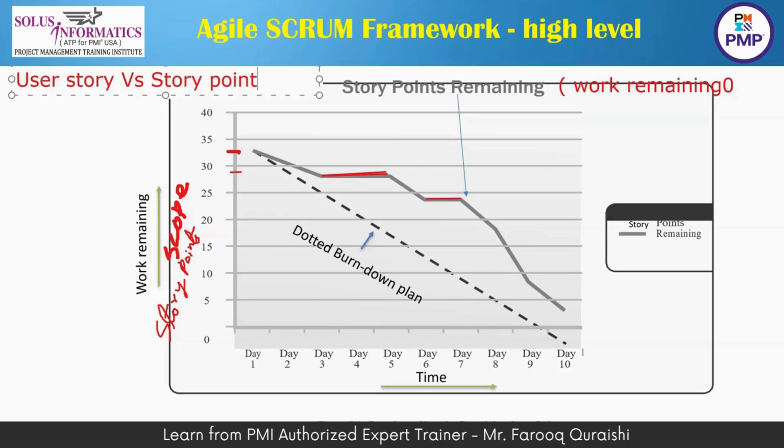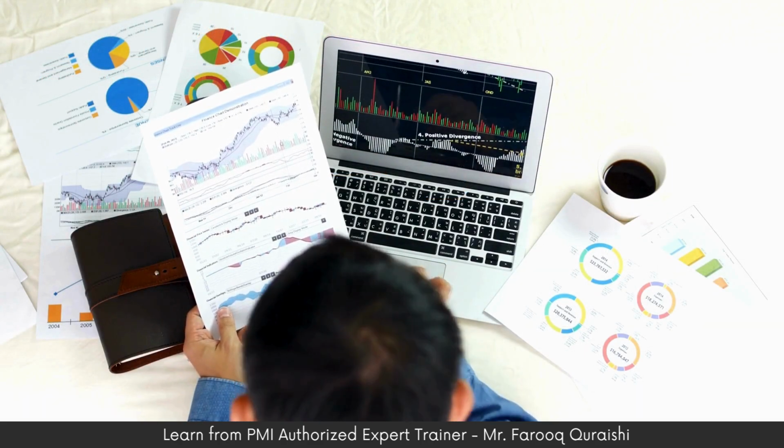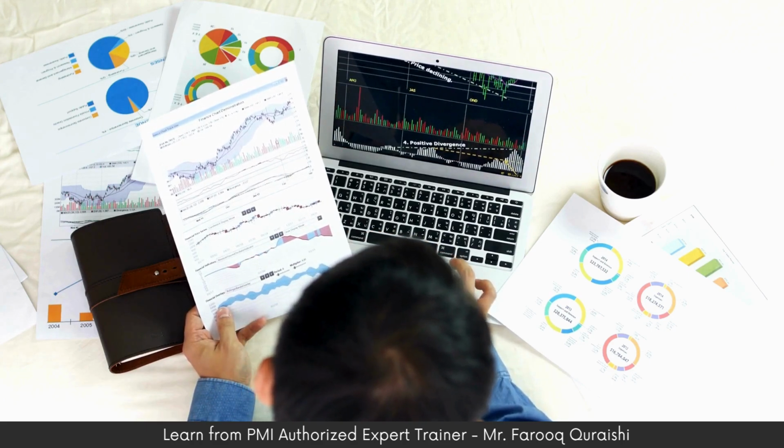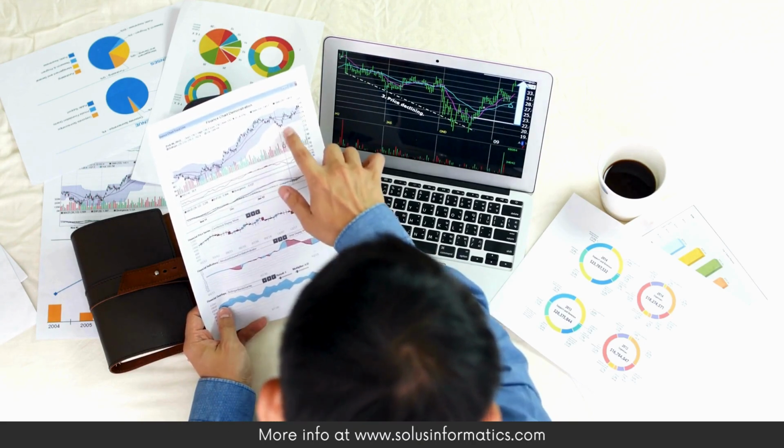Story point is an indispensable technique for performing initial estimation. A story point is a metric used in agile project management to estimate the difficulty of implementing a given user story. In simple terms, a story point is a number, like 1, 3, 4. It tells the team about the difficulty level of the story.